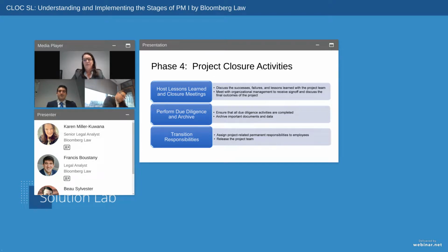overview of the life cycle of the project and what happened, what you accomplished, summarize the work that was performed, demonstrate that all the deliverables have been completed. You want to obtain final sign-off or formal confirmation that the project is complete and has met the objectives.